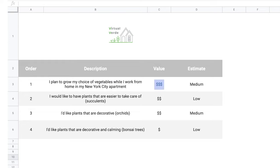Next is the Value field, which tells us how much business value the item delivers to the customers, the team, or the users. How to indicate value is a choice the Scrum team should make together. I like to set value using dollar signs, ranging from one dollar sign for low value all the way up to four dollar signs for high added business value. Next, we have the estimate — how much effort the Scrum team thinks an item will take to complete. The relative effort estimate is captured in each backlog item, and this field is owned by the development team.